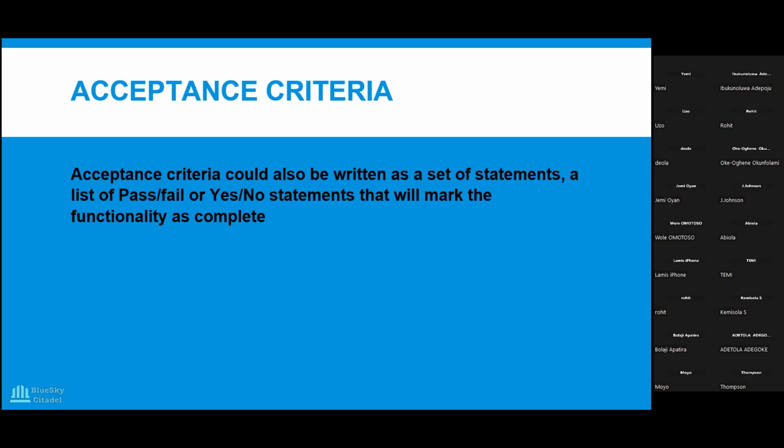Now in a team of BAs, our acceptance criteria are really different to the other one I described for you, like the Gherkin syntax, where you say given, when, then. What we do is we have a list of statements. So we can say landing page has been created, or Confluence page has been created. If you've completed it, you put a tick box there. Next one, relevant information has been uploaded or updated on the Confluence page. You can tick it.